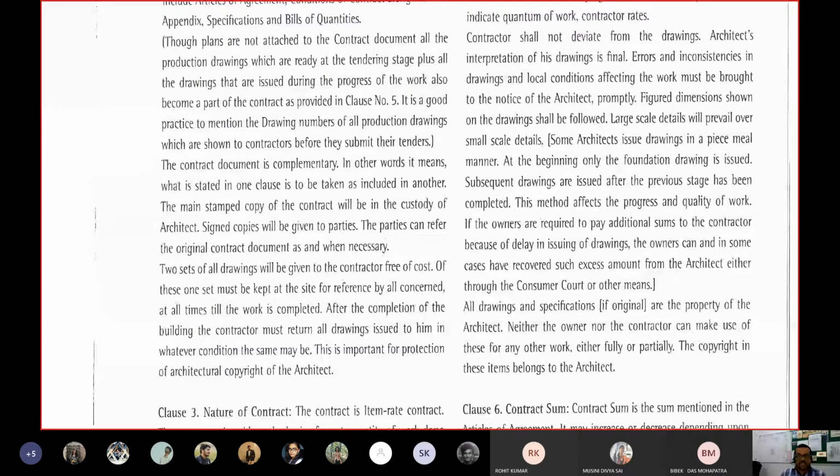Okay, any changes instructed at the site, which is a modification of the contract only, if the contract document keeps the scope of that, those have to be added in the document that is being used at the site, and later it can be cited as an addendum or as an additional addendum in the contract document. The original copy which was kept in the site office was given something, and the modification which was instructed in writing by the architect or by the client is there in the third copy.